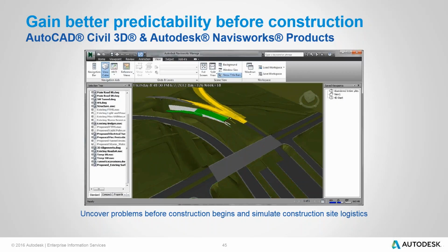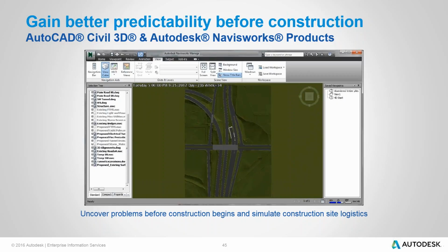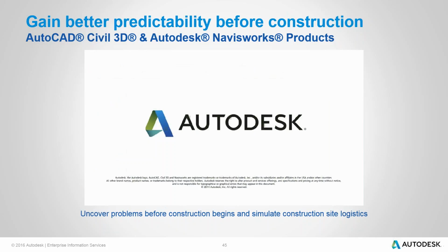When it is time to break ground, enhanced 3D models can be used to sequence construction activities and guide construction equipment. With Autodesk Navisworks software products, project engineers can visualize 4D sequencing to help improve staging and scheduling. This can help speed project completion by reducing idle time for workers while helping to better predict leasing, maintenance, and fuel costs for the construction equipment.